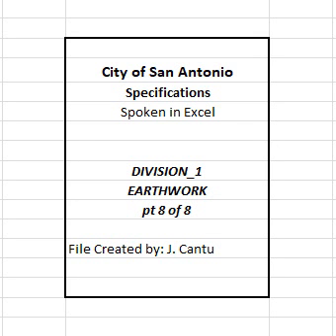109.6 Payment. The work performed and materials furnished in accordance with this item and measured as provided under Measurement will be paid in accordance with Section 109.5A, Cement, or Section 109.5B, Cement treatment. Removal and disposal of existing asphalt concrete pavement will be paid for in accordance with pertinent items or as agreed upon with the city through the change order process.